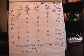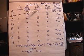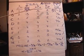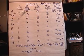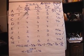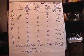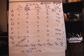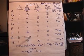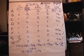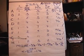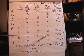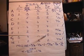So we would take one plus four times two, that's eight, plus three is twelve, divided by six is two. Of course this is pretty easy if the difference here is the same as the difference there, then it's just right in the middle. Likewise here is the difference of one, difference of one, so it's three. This one down here was different, difference of one, difference of seven, so we have to use the formula. Three plus four times four plus eleven divided by six will give you an expected time of five.